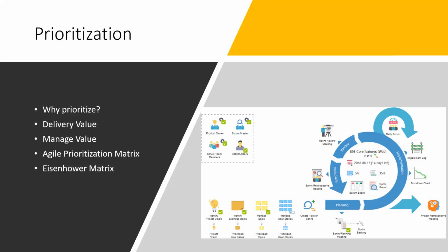When you develop a feature of the product, or a product increment, the stakeholders, even the users attending the call or meeting, would say, hey, for the next thing, can you prioritize this? Because we feel at this moment that is important for us. So you have two points within a sprint, planning and review, where you do prioritization.